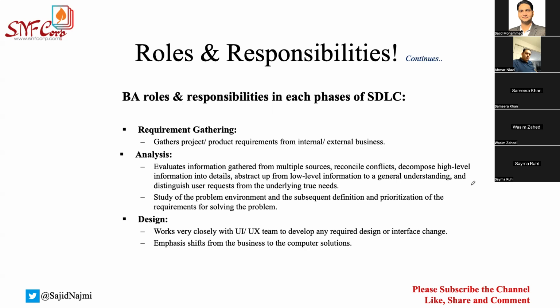Once you have captured the requirement, you do analysis. Now, the BA also plays a very important role during this analysis phase. Once you have captured the requirement from different sources, you will have to reconcile everything. You have to find the conflicts. You have to decompose the high level requirement into smaller chunks.